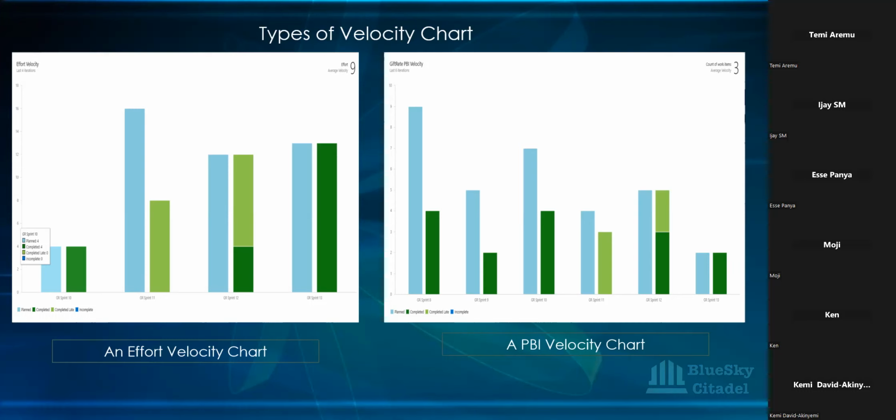Okay, so yeah, what it is telling you is what you've just said. It's saying that the work remaining is projecting based on the rate at which they're working. Like I said, your charts are real time, so it knows when the stories are moved.